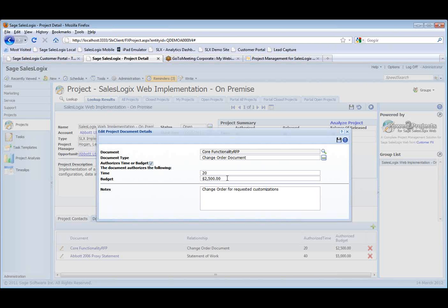And again, it's based on the fact that in the real world, we require customers and clients to authorize time in writing, which usually means there's going to be a sales order, a change order, a purchase order, some piece of paper somewhere that somebody has signed or authorized that's going to contain hours and dollars in it that we can load into the project. So again, this is how time and money becomes available to be spent on a project.